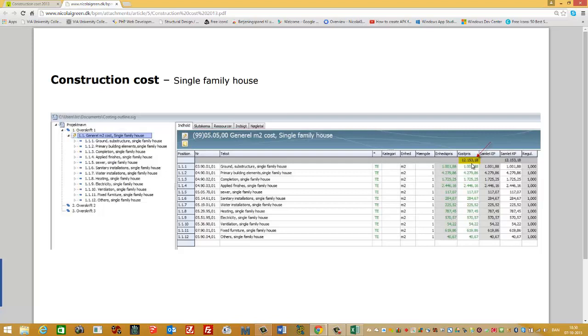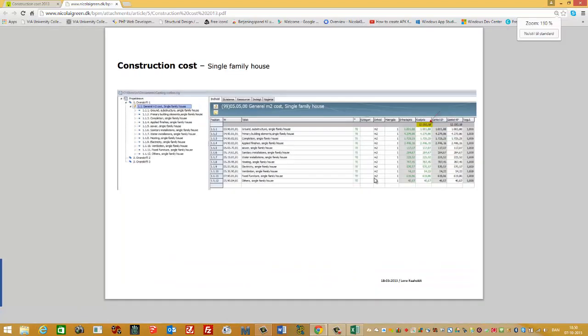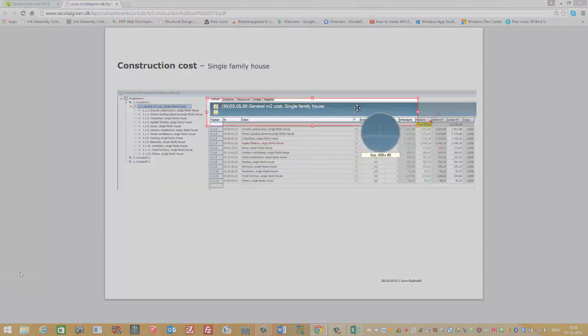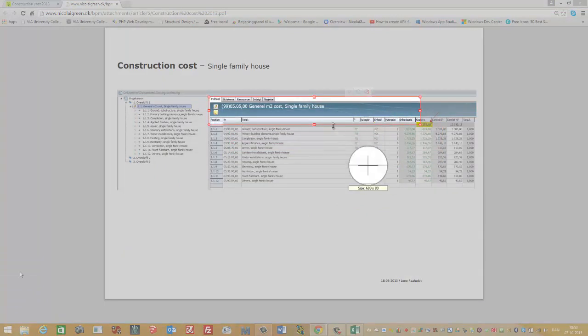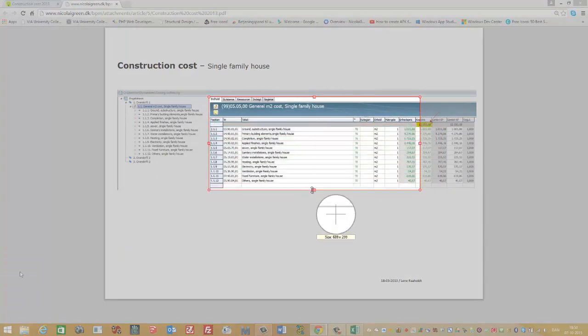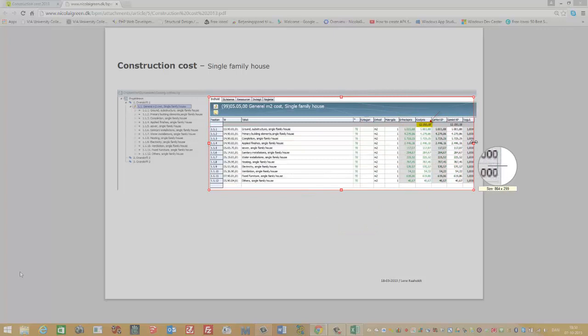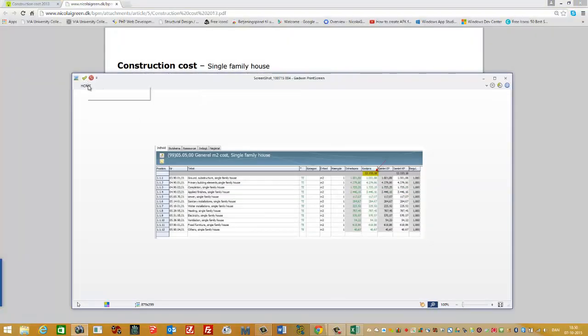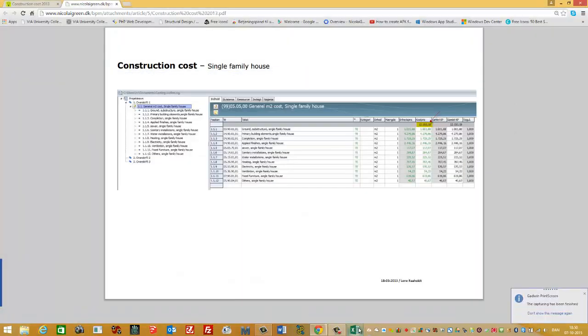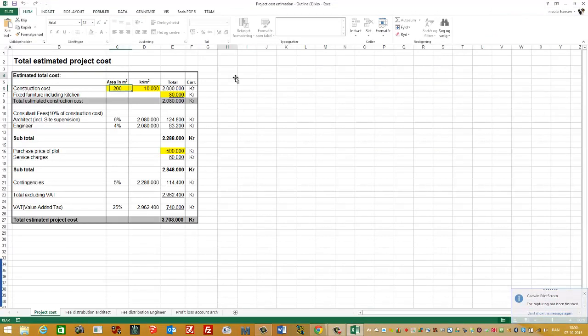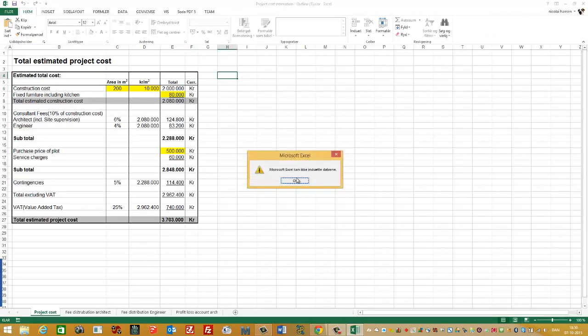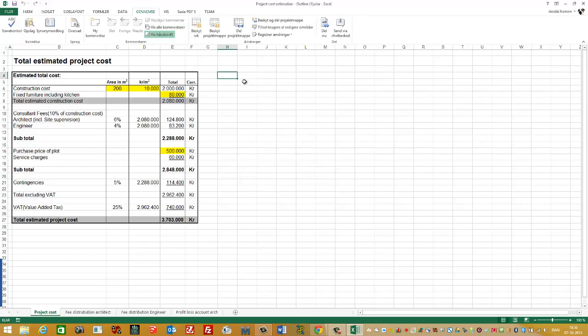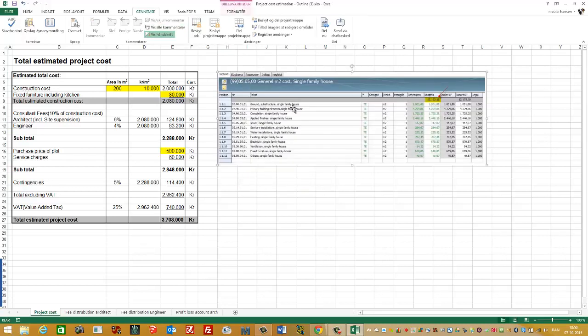Again, this price is from 2013, so we need to update it. First of all, I take a screenshot of this so I have it as documentation. And I go back to Excel and paste it in.